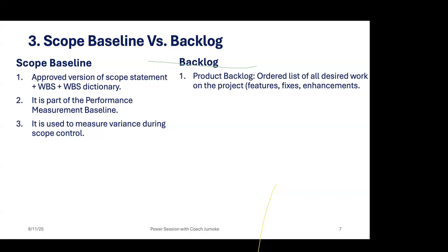So if you read any question and they are trying to make it look like, hey, there's an emergency, unless the Scrum Master communicates with the product owner and for some reason the product owner is not available, and at that moment authorizes the Scrum Master to stand in for him or her. But if there is nothing like that, it is the responsibility of the product owner to prioritize the items in the product backlog. And it is this prioritized product backlog that will be given to the development team, and they will pick according to their velocity. And the velocity is determined by the number of story points that they can complete within their iteration.